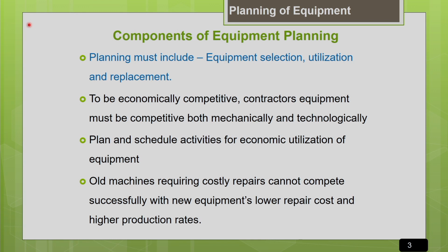So generally, how do they choose it? There are some guidelines. Generally they go for an economical method of approach. They compare the machine performance in terms of productivity. Whichever machine gives you the maximum productivity at the lowest possible cost, they will go for the selection of that particular machine. This general guideline we should always keep in mind.